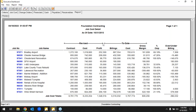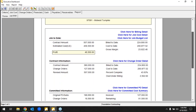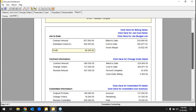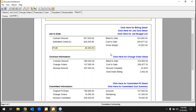These are my active projects as a user — I can see total costs compared to estimates, contract amount compared to what we've billed, and percentage of completion on each job. Anything blue in our software lets you drill down. You can click on a project and dive into a traditional report with that basic starting information, showing estimated and actual profit. Everything is alphanumeric — jobs, vendors, customers, cost codes — so people can structure that differently.